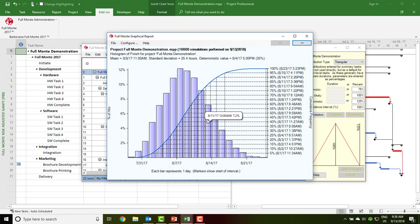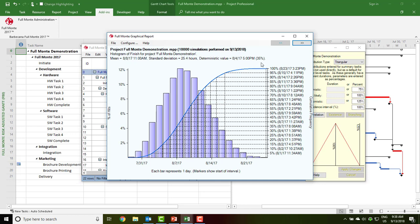Here is the finish histogram for the project. As all the uncertainty was symmetrical, plus or minus 25% around the estimated durations, you might have expected that we would have a 50% chance of delivering the project on time. Unfortunately, this turns out not to be the case and we only have a 35% chance of delivering the project on time, even with the symmetrical uncertainty, due to the effect of merge bias.